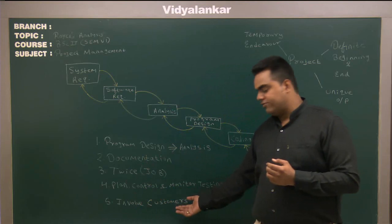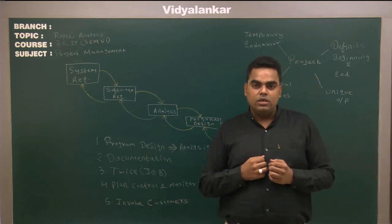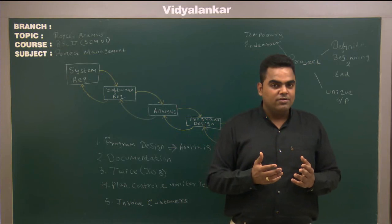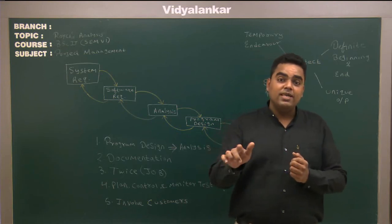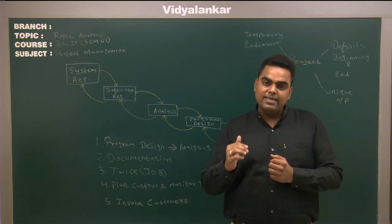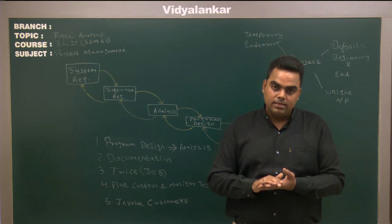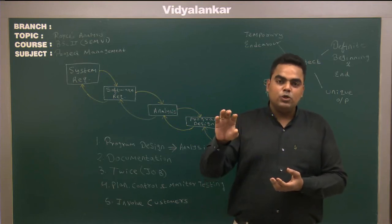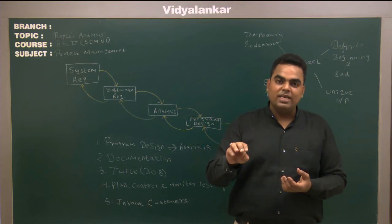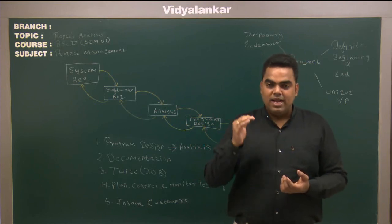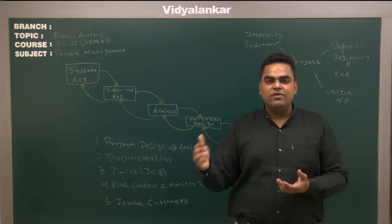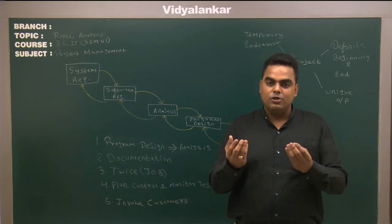The last step is to involve the customer. For example, if there are five modules in your application and you have developed one module, show it to the customer. Ask them whether it is correct, and if they want to modify something, do that modification at the beginning phase only. When customers approve all the modules at the beginning phase, after integrating them together you will generate one application. Show that application to the customer, and if satisfied with all the modules, they will give the final approval of your project. This means at early stages you have got approval of each and every module from the customer, and then you are just integrating them and supplying the product.